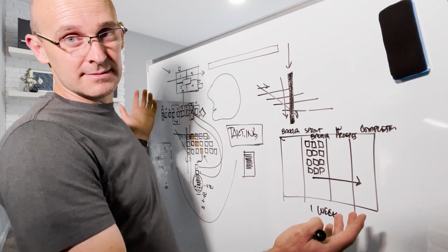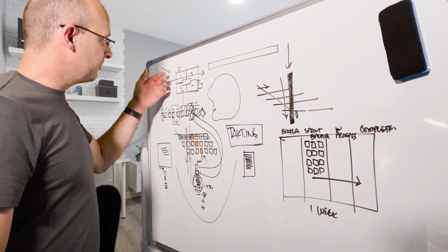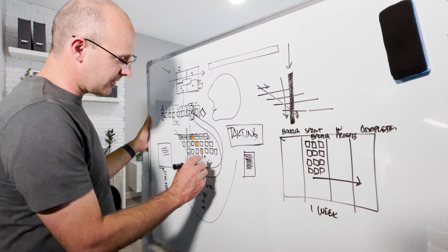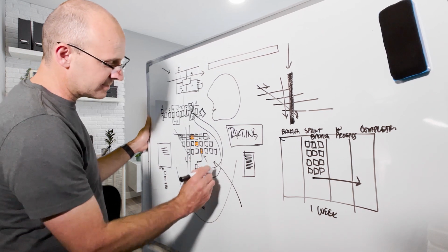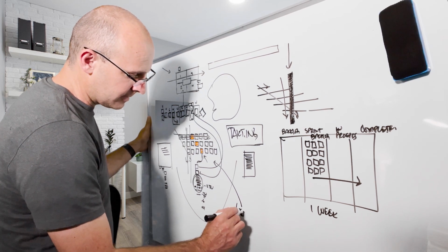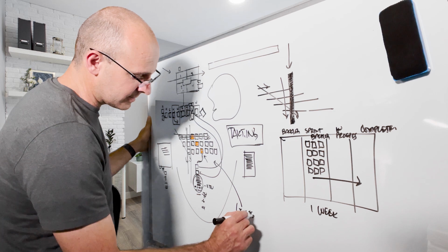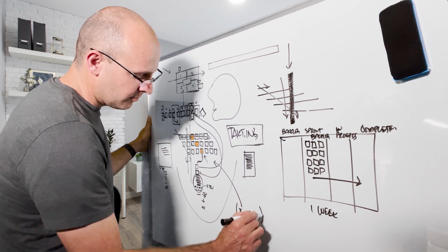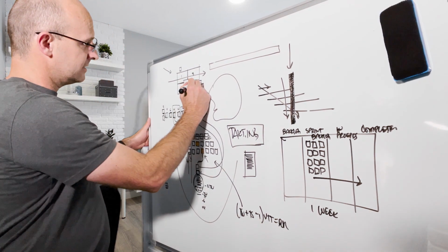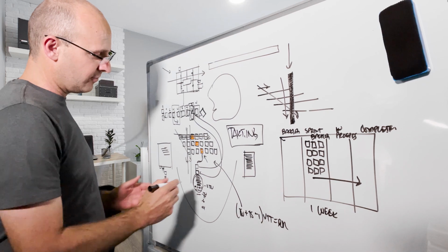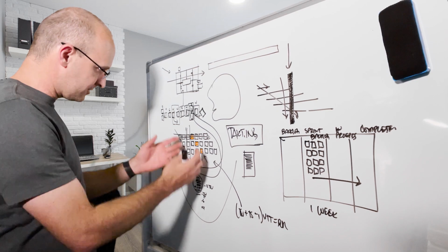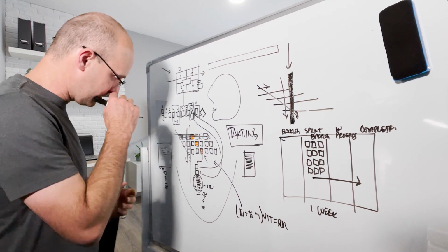But like, this is the system. This is how it works. You break out your areas, you do your pull plans, you create your Takt plan. One thing I forgot to tell you is you'll do an analysis with the formula that your Takt wagons plus your Takt sequences minus 1 multiplied by your takt time equals the overall duration. And you'll see, hey, should I break these up into more areas to where I have 8 instead of 4? So you do the formula, but once you have the formula and you've put your constraints into the Takt plan, you put in good buffer management, right?